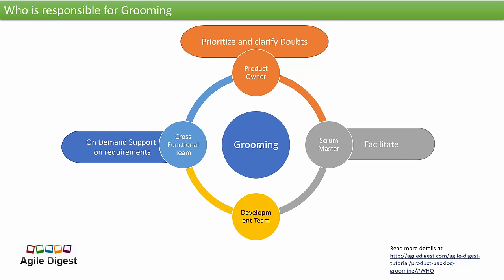The product owner always prioritizes the backlog and clarifies doubts asked by the development team. The scrum master facilitates the entire grooming session. The cross-functional team supports the development team for cross-functional dependencies and risk identification. The developer tries to understand the requirement, and once all clarification is clear, we do an estimation — through planning poker, complexity bucket, or similar — and assign story points. Once we have everything, we mark the story as groomed and move to the next story. Everyone — product owner, scrum master, development team, and cross-functional team — mutually makes the story ready for the next sprint planning.